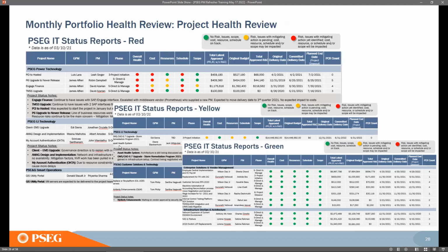These are the key fields we use on the final deck for the projects. We basically point out the committed delivery date. We always ask you to change that if there is any doubt and you cannot complete the project. Please try to submit the JD for that committed delivery date so you can get approval before we put it on the RAD. Once you pass the committed delivery date, we have to mark it as a RAD project, so please keep that in mind when you submit the report.